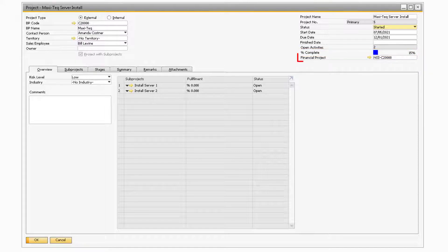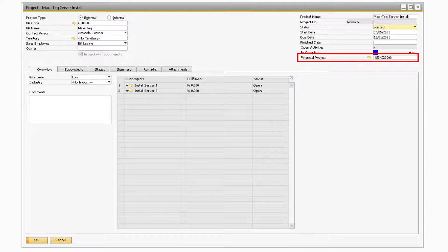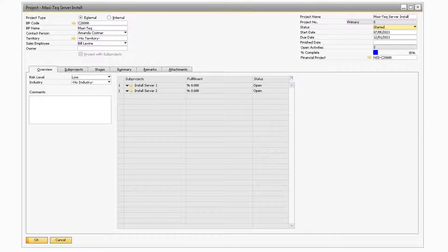The final field in the header is the Financial Project field. If your company utilizes any financial projects, you will be able to assign one to the project in this field. Please note that if you plan to assign time for employees against the project, you will need to assign a financial project to the project.